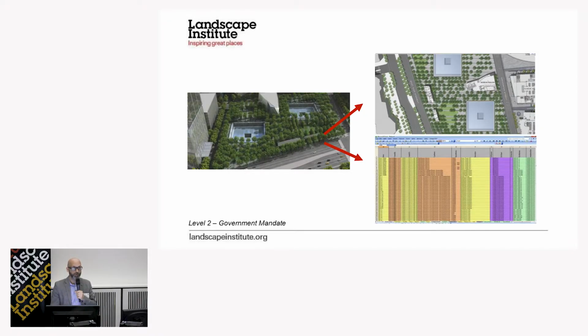Again, we have a model. From that model, we can take construction documentation from our traditional sort of 2D output, but also we can take the data as well. Now, the data that you see, so particularly perhaps lurid colours being used, this is a COBie data deliverable, which is within the BIM Level 2 mandate. So if you're asked to comply with the BIM Level 2 mandate, you may well be asked to output this particular format of data.